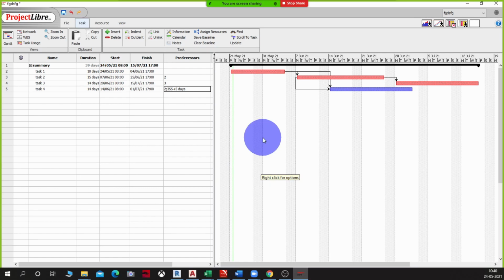Yes, sir. Sir, one more thing that was happening was when I linked task 1 and 2, and say task 1 is 10 days and task 2 is 15 days, when I linked those two together, it gave me more than 25 days. It came some 30 days, 44 days, something like that. Yeah, that could happen because of the Saturdays and Sundays in your calendar.